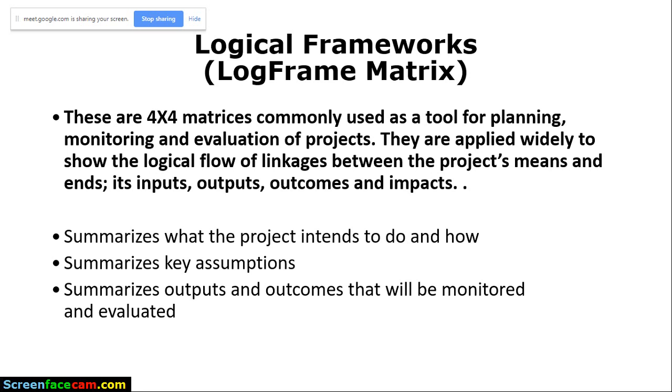So immediately they write processes, then you should know that what they are talking about are the results. So the logical framework, the other name, as you can see on my screen here, is called the log frame matrix 4x4. For this one, it just shows the linear linkage between the inputs, the activities, the outputs, the outcomes, and the impacts. In other words, this framework will just show that chronological sequence of how things are happening from the start to the end.